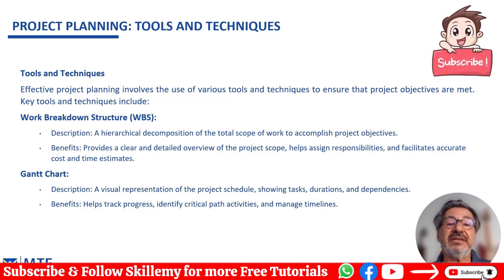Benefits: they provide a clear and detailed overview of the project scope, help assign responsibility, and facilitate accurate cost and time estimates. A Gantt chart is a visual representation of the project schedule, showing tasks, durations, and most importantly, dependencies. This task can only begin when the other one has finished, so we need to know where we are, what are the impacts of any slowdowns that might happen on future tasks. Benefits: helps track progress, identify critical path activities, and manage timelines.